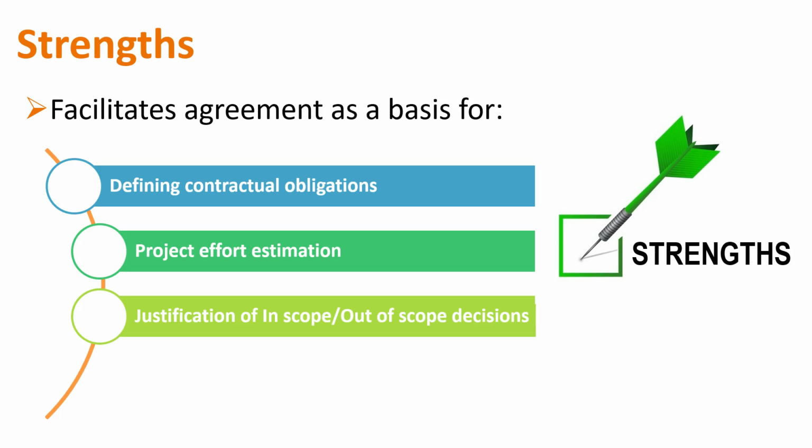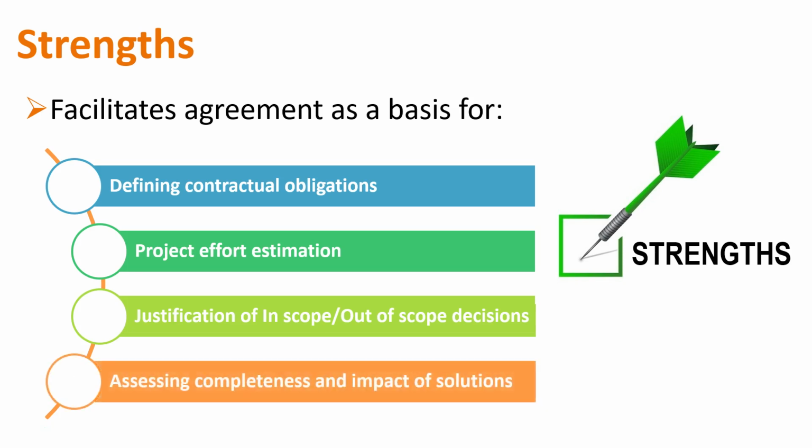So now I've got justification for in and out of scope, so that when we're in the middle of the requirements process and someone says, oh, I need to do this, and you look at that and you're asking yourself, okay, but I can't see where that falls in the scope, right? And so what that does is the picture is saying it's out of scope. It's not you, the analyst. So that makes it easier for you to justify it with less emotion. You're not going to have the emotion. It's usually the person you're telling no that's going to have the emotion.